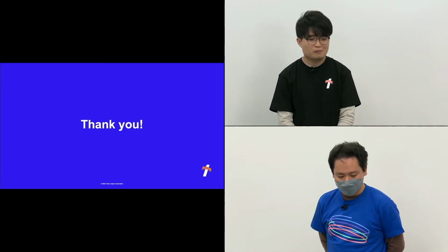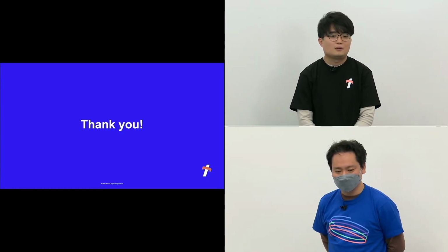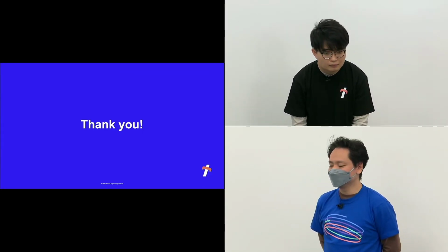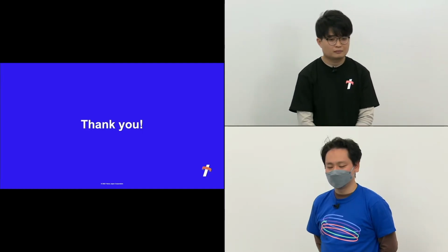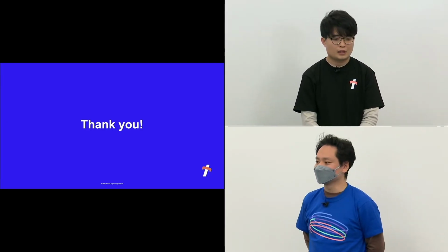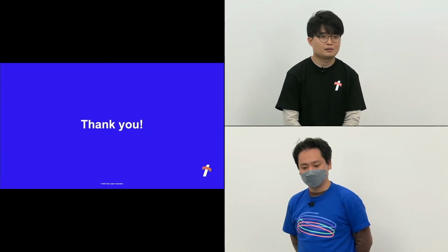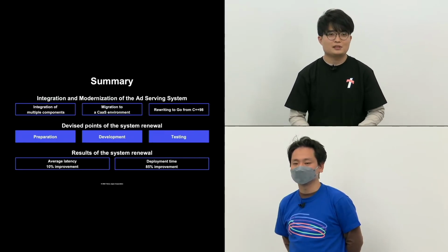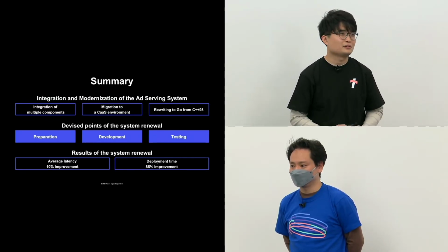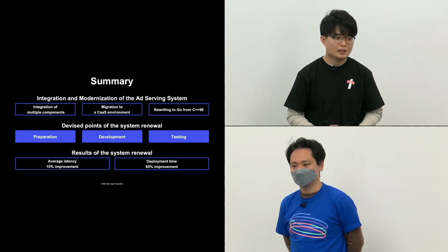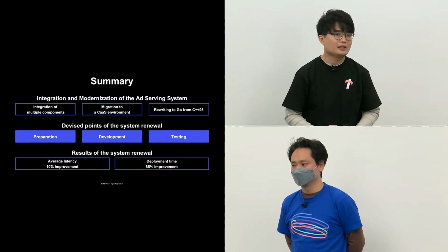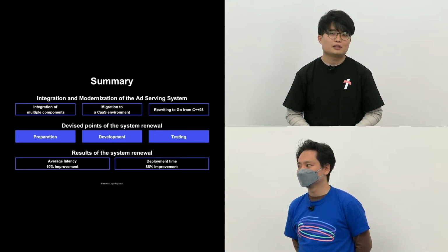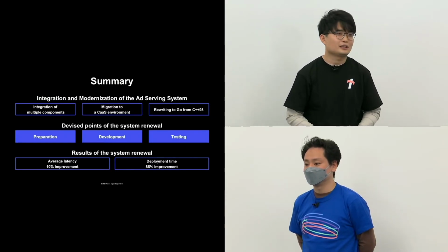Matsuno-san, after listening to the presentation, what are your questions? Yes, from the audience we got some questions as well, but this is a similar question. What was the duration and what was the size of the team working on this project? Thank you for the question. There were several different phases. In the beginning, we started with a small team for the development. About 18 months it took with a team of 4 to 5 people, but eventually the team expanded to about 10 people.